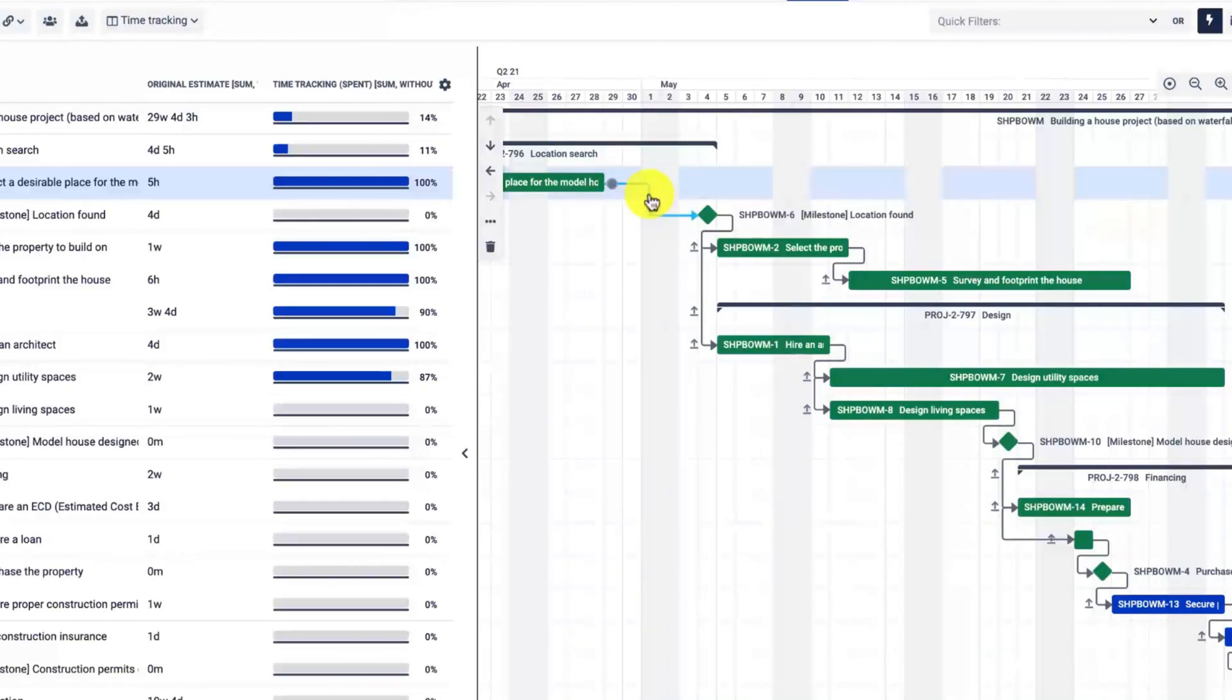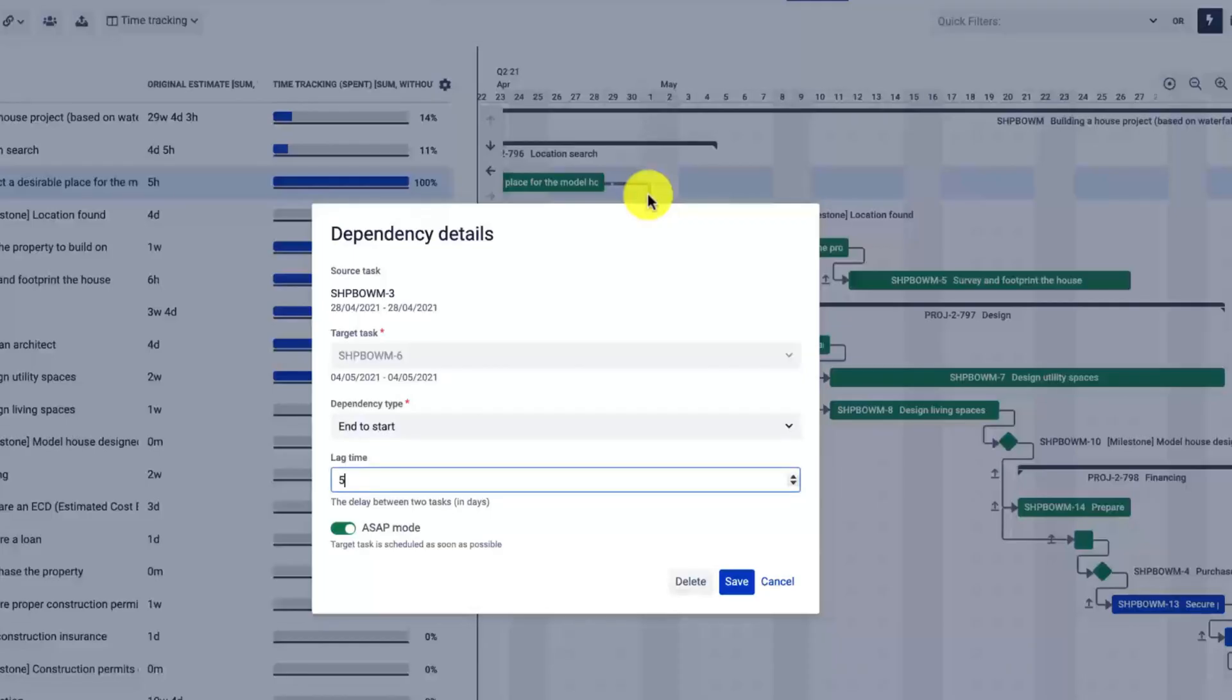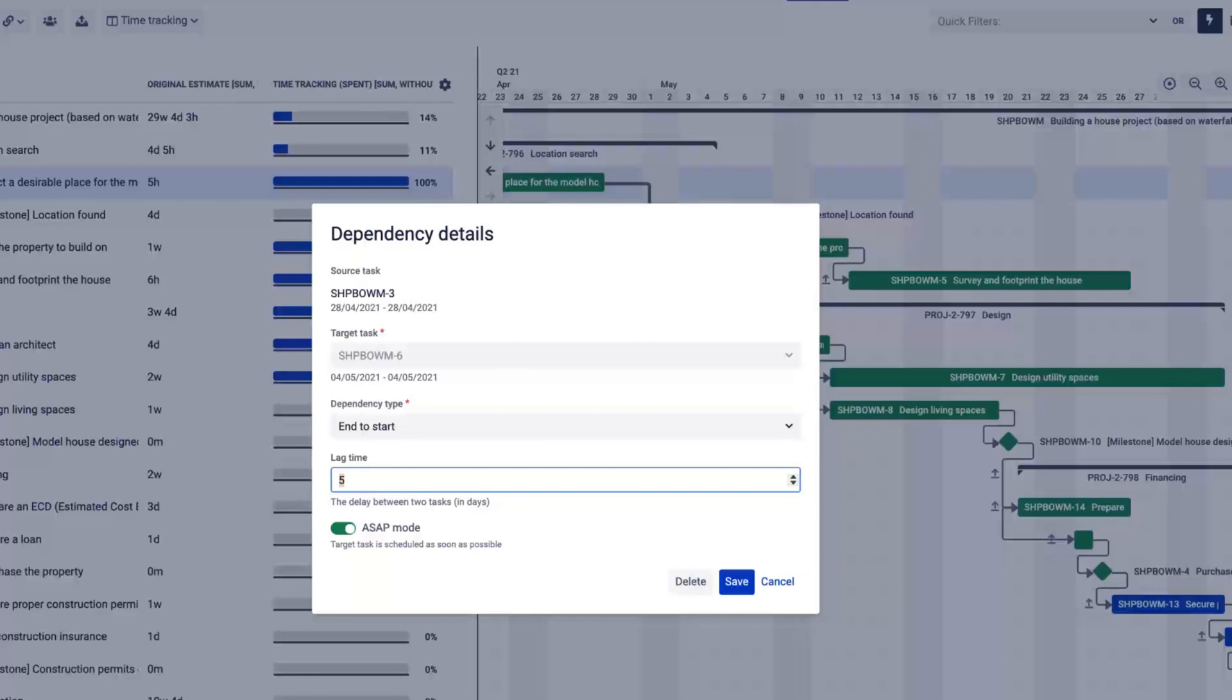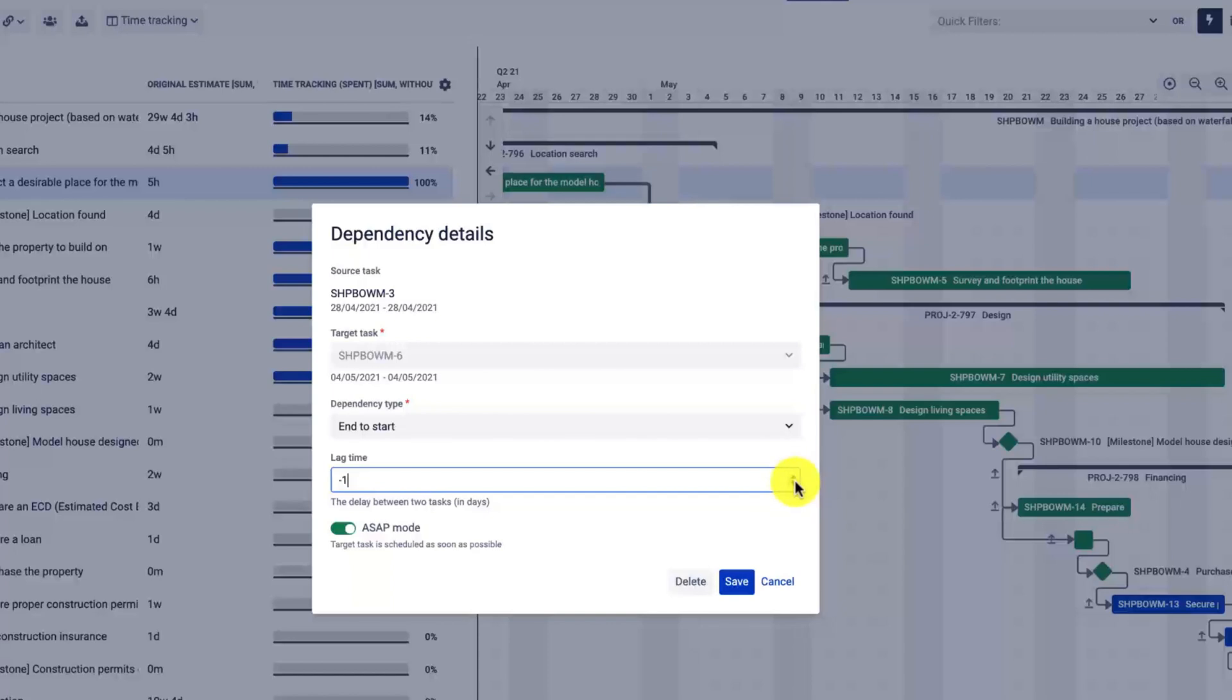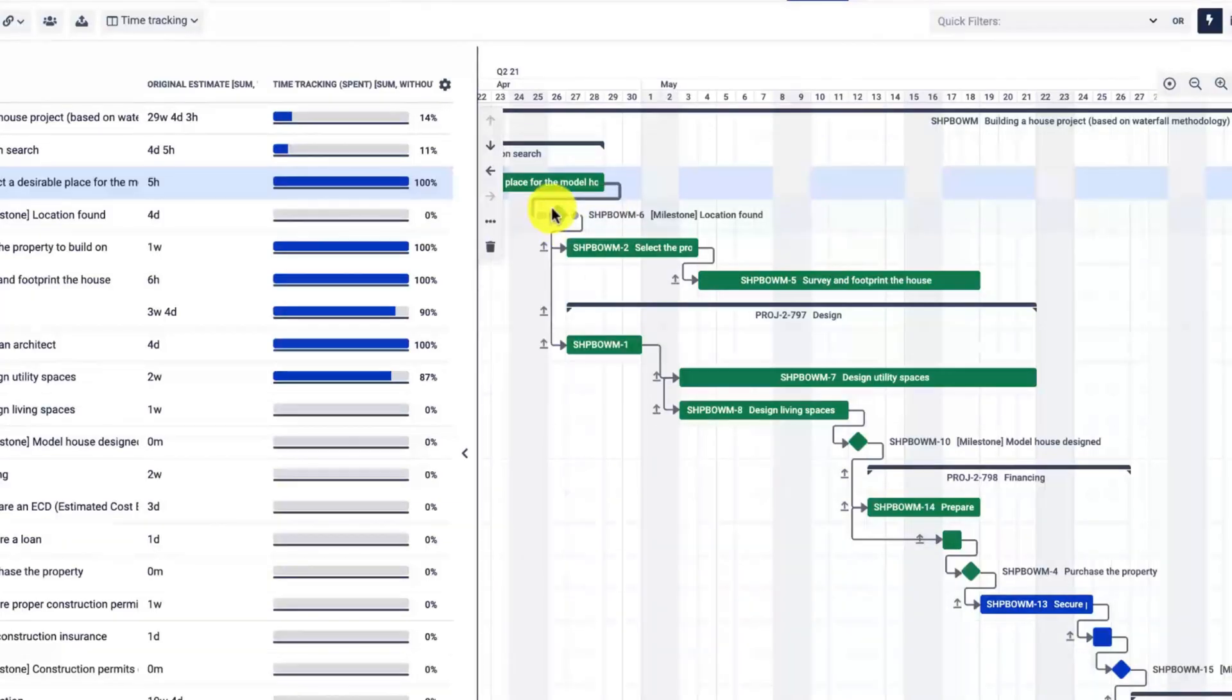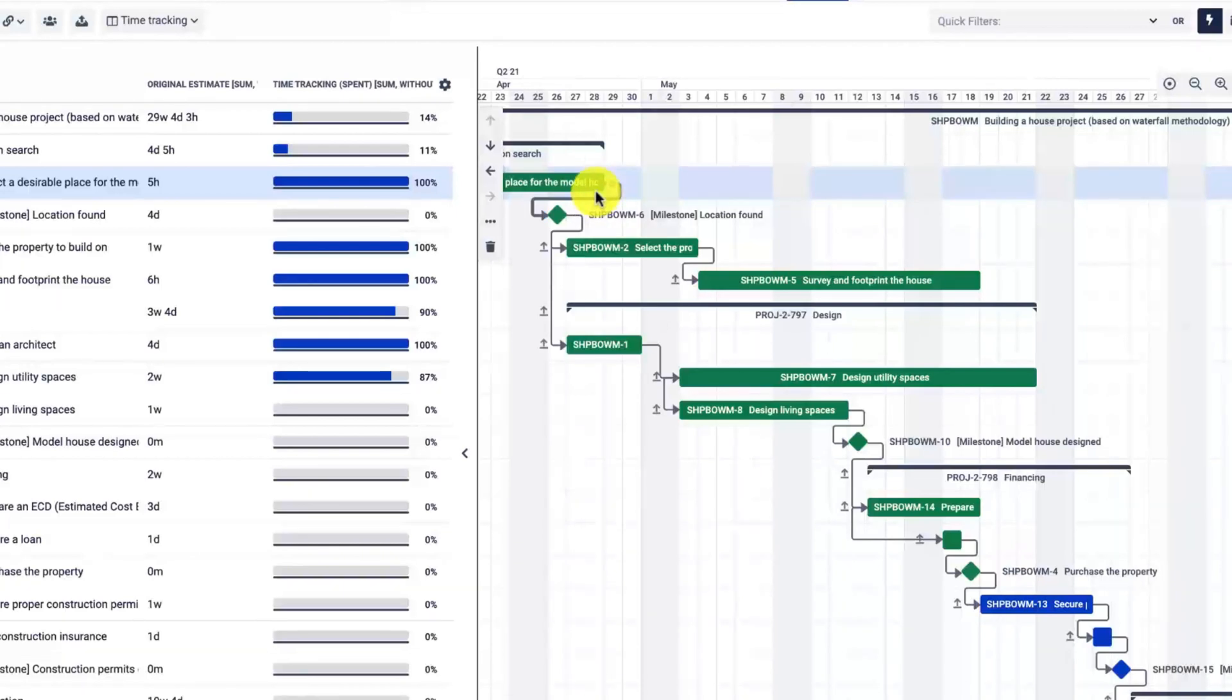The lag time can also be set to a negative value in case you want to show that the successor starts earlier than the end date of the predecessor. This is especially useful when you want to show a milestone, which is a point in time—it doesn't behave as a regular task, it is a moment in time.